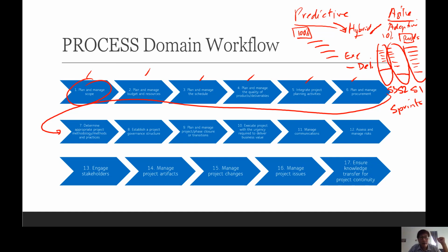As far as interior design, let's say there are three things: putting in built-in cabinets, carpeting, and wallpapering. Let's say three major parcels, right? In interior design, we can make it agile. It doesn't have to be predictive. If predictive, it will be this way: I put in the cabinet, then later the wallpapering, then finally the carpeting.